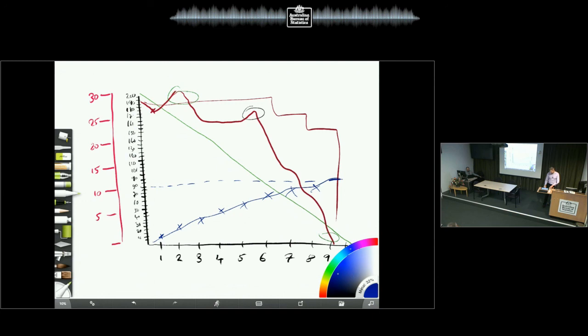Now, it could be that it's reasonable because there's loads of several defects that you're trying to address, or this could be lots of senior managers tapping the team on the shoulders, asking them to do some really important stuff without the understanding of the project sponsor who's paying for them at the time. So this is a good visualization technique to say, we think we're going to fail a sprint because the team keep getting sidetracked and the context switching. So quite often I've used that to give guidance and redirective feedback and soft coaching to some of the senior managers.